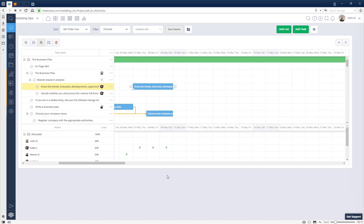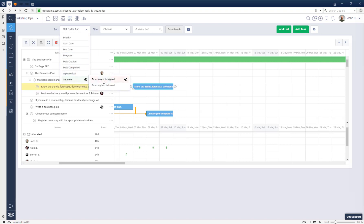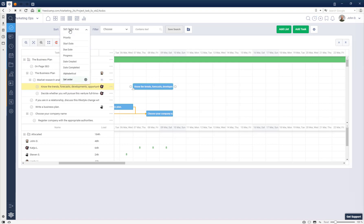We added drag and drop for tasks and subtasks to our Gantt view and it will only work if sort order is set to from lowest to highest. So if you use full screen mode as we will use now, please set your sorting because it's hidden in full screen mode.